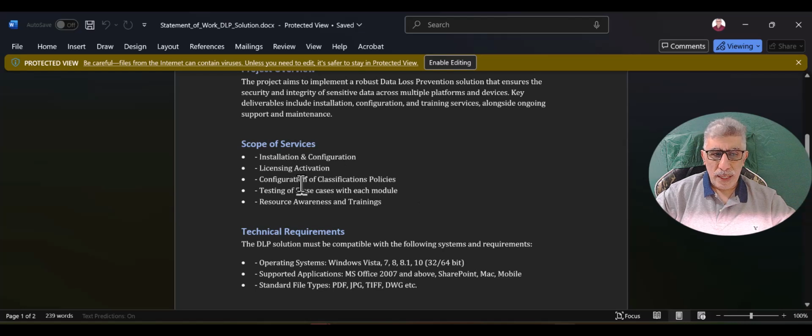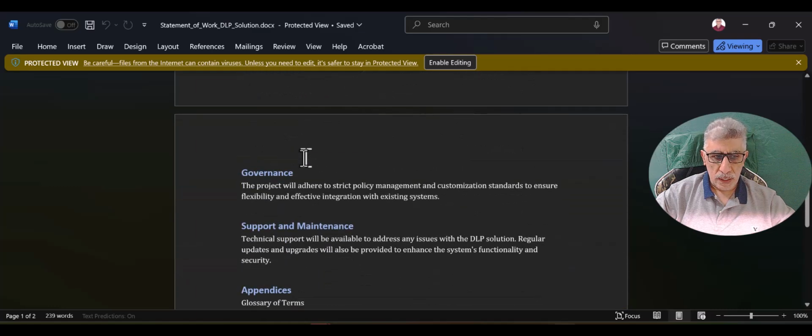From where are we getting exactly what we have, what kind of platform, what kind of operating system, what kind of files? We are getting that from the asset register that we explained before. So if the company has a proper information asset inventory or information asset register, they will have the list of all types of information they have, and the list of all the hardware, servers, and operating systems. Accordingly, you can go through them before writing your statement of work and sending it to the vendor to confirm that their solution provides all those characteristics.